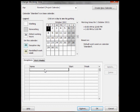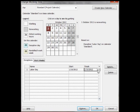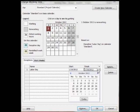To do this, select the day on the calendar you require to change and enter the reason for it being a holiday in the exceptions area. If the holiday is more than one day, you can adjust the finishing time.